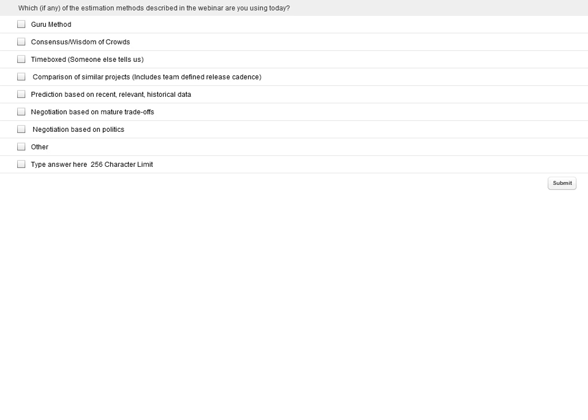I might add things that I find later. Let's go. And you run those across the board from untested to doing to done. And then you come back every hour or every 4 hours and say, this is what's left. Can we make it? Can we ship? Or whatever the decision we're trying to make, right? Should we go do something else? We're doing continuous delivery. Have we done enough general testing and go focus on something else?